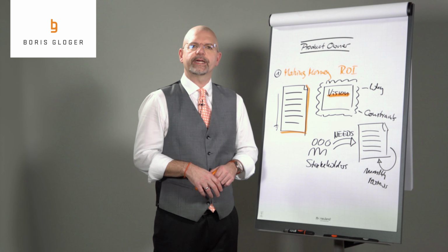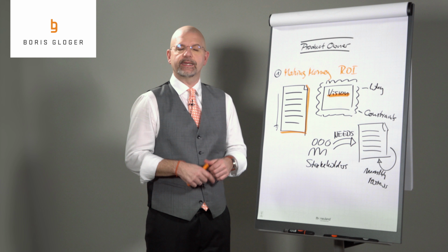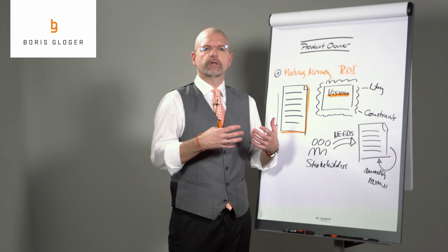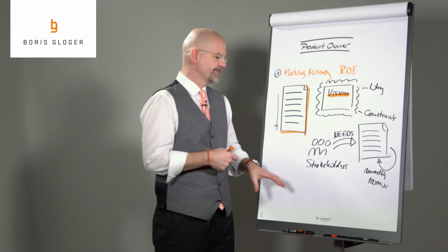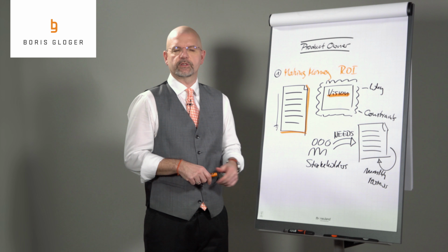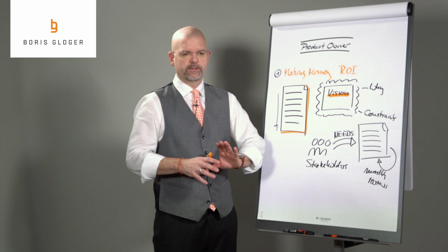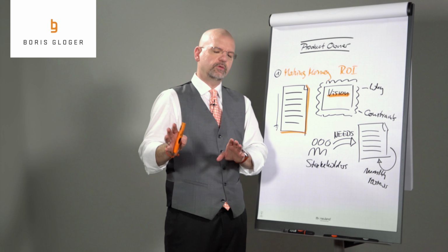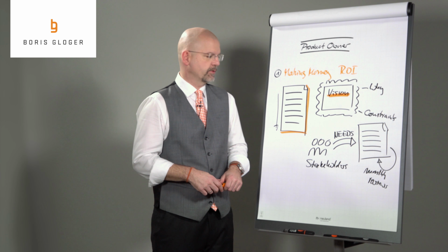Sometimes you really need to have long discussions with your stakeholders because they certainly would like to change something on the prerequisites of your projects, and these are the constraints, and that might mean you will have a huge amount of work because of the new requirements of your stakeholders. So sometimes it's much better to discuss these business constraints and say, okay, that's a new project, then include it into the project, especially if it's later in the project.